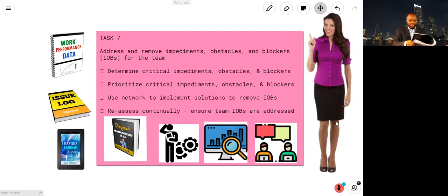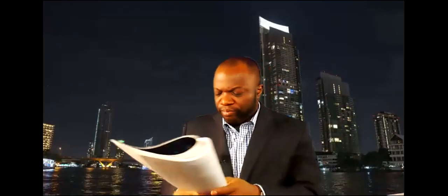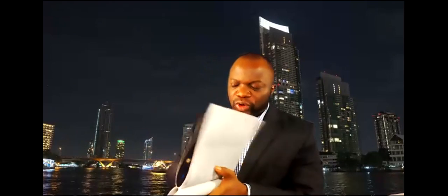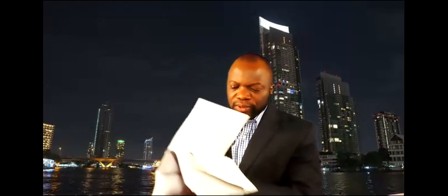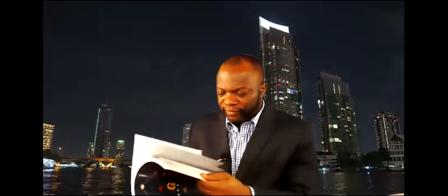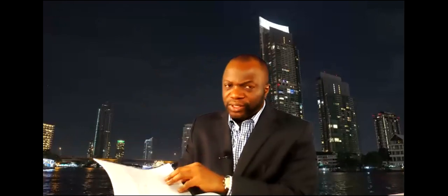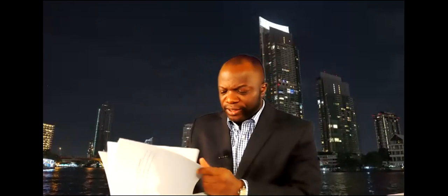So if you follow me to the glossary of the Agile practice guide, let's go there really quick. The index, page 161. What do you see when you look for impediments? Impediments defined, page 152. So this is language that you can expect to find. An impediment is just something that impedes one of the team members or the team as a whole from getting to the sprint goal.